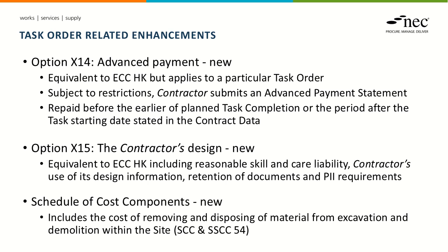And then in terms of repaying that sum, it's repaid as we move through from the starting date of the task through to completion. Again, we've got flexibility here to deal with depending on how long it takes to complete a task. We state a period in contract data, a default period if you like. But if planned task completion is sooner than that period finishing, then repayment is made by the earlier date.